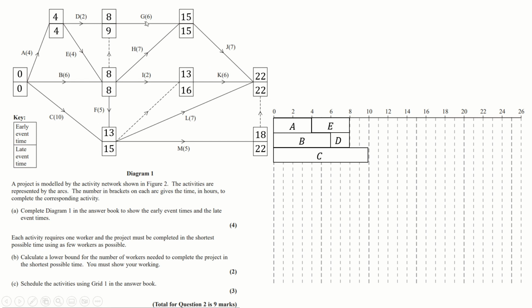G is unlocked now. We could do task G, and we could also do task H, I, or F since E is now complete as well. So we'll just put the first worker on H, why not? And we could put the second worker on G. Again, trying to follow this critical path, I guess, is important to try and get that done early. Worker C finally finishes. We may as well complete task F now, so that we can unlock some of these tasks over here. I still needs doing if we're going to try and get K done eventually. So when this guy finishes G, he may as well do I.